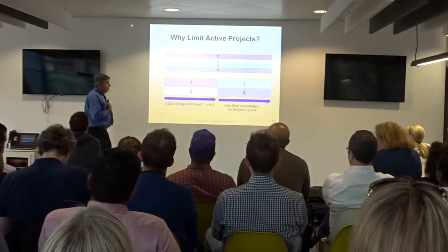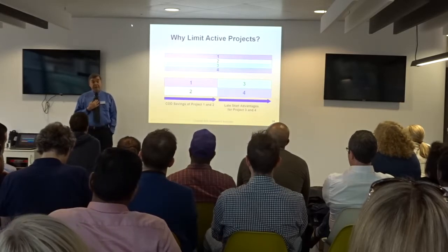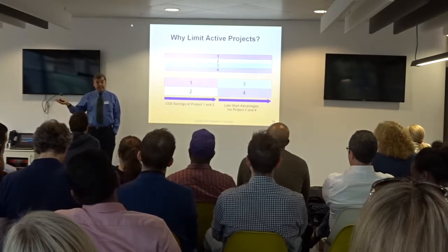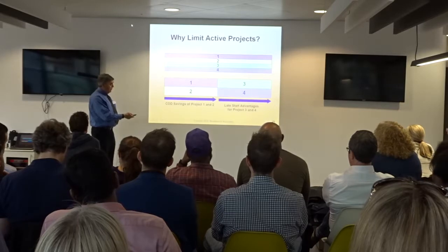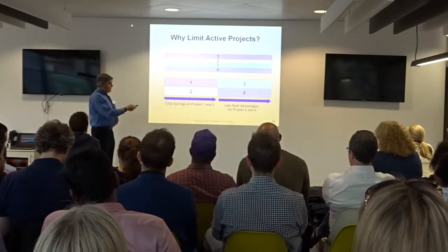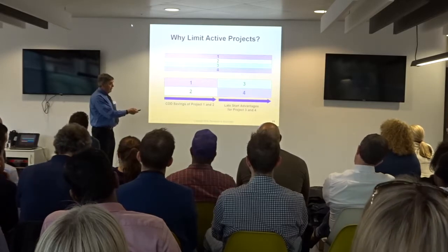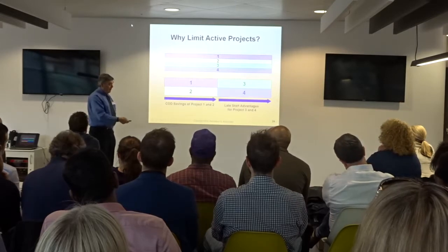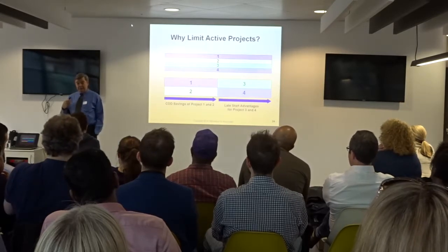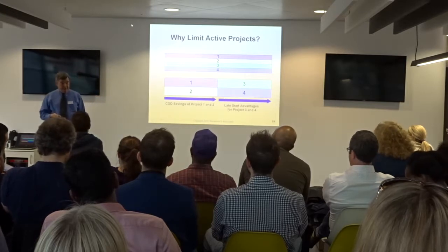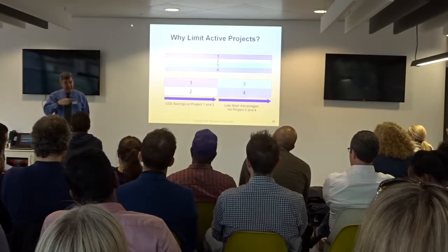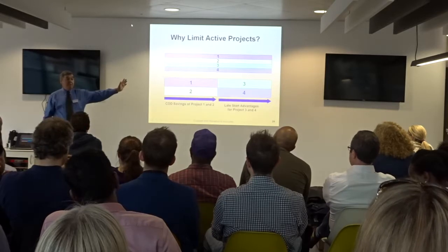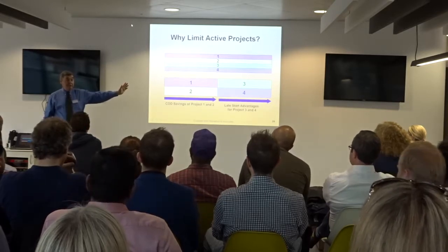If I'm dealing with somebody who knows the cost of delay, this is a very short conversation, because I say the average cost of delay on your project is $100,000 a month. If you use the lower approach, then you save a year of cycle time on project 1 and 2 in time to market. 12 months times $100,000 is $1.2 million. 2 of them, that's worth $2.4 million. So it's $2.4 million a year of extra profit. And so explain to me why you think it makes sense to dilute your resources across 4 different projects. Because you'll still have 4 projects done at the end of 2 years.